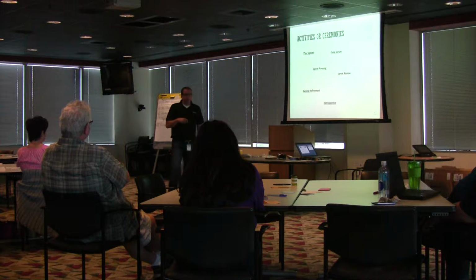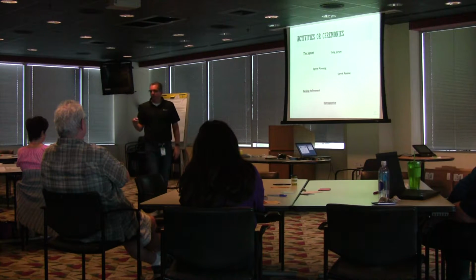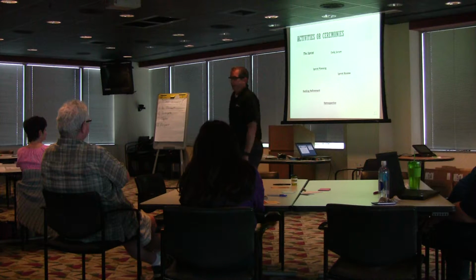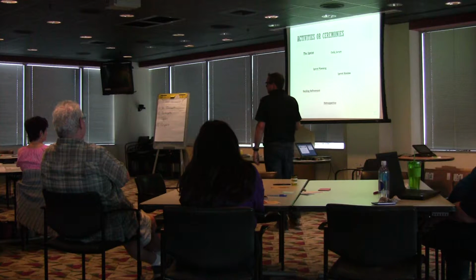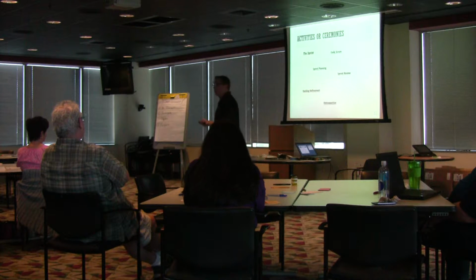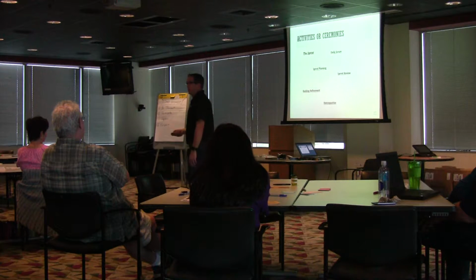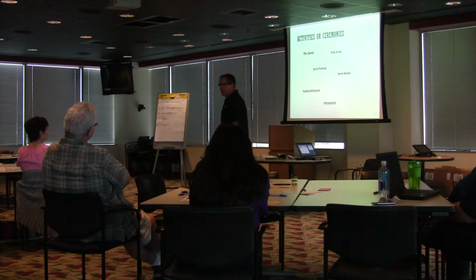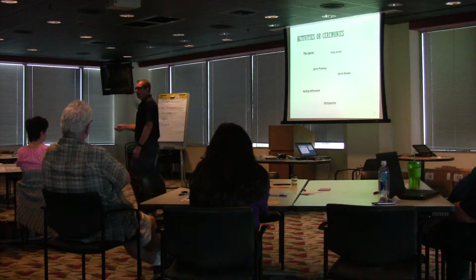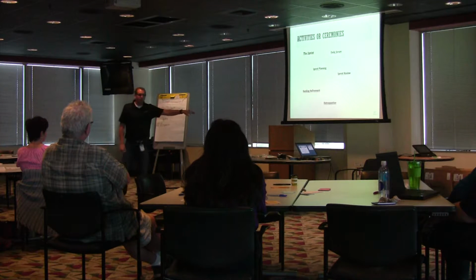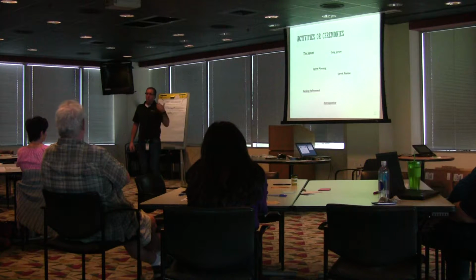But backlog refinement, important or not important? Critical, right? Absolutely critical. Because if we're not refining what the thing is that we need to build before sprint planning, what an excruciating sprint planning. I've been in those. They're horrible. They sometimes bleed into a couple days. Awesome, right? Because we're doing all the design and all the elicitation right there. Bad place to do it. So do it incrementally. If you believe in Agile, regardless of whether you're in Scrum, whether you call it backlog refinement or not, think of everything that we do in increments, right? Try to do it incrementally.